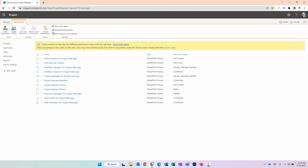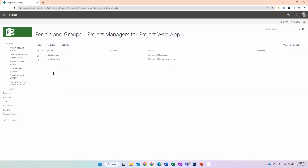Once I click on that, there are a number of things I can do here. There are two ways to add users from here. The first way is to click on the group that I want to add them to. We're going to focus on Project Managers for Project Web App — you'll want to look at the ones that have 'Project Web App' after them. These are the groups created by default that allow capabilities and functionality based on role within Project Online. Click on Project Managers, and you can see there are a couple already added: Barbara Liner and Carly Axelrod.